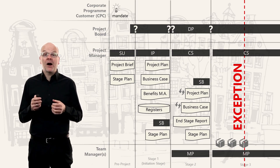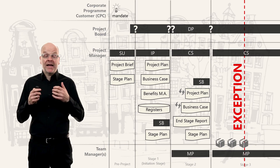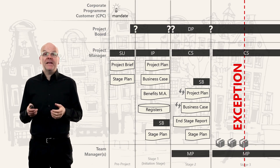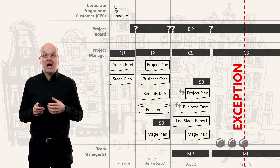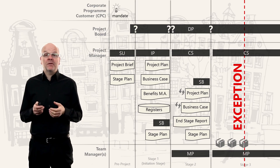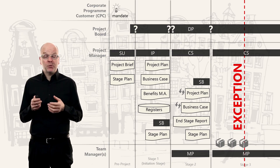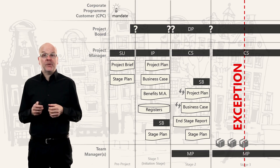The project manager can deal with most issues because they remain small, but some issues are big and are exceptions. Let's say that during the stage our cost tolerance was 10 percent and we now have an issue which will bring the costs up to 20 percent.